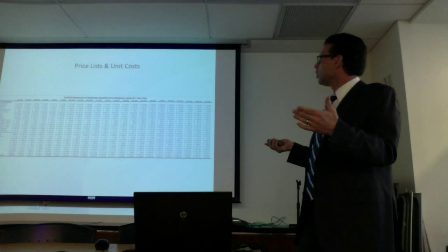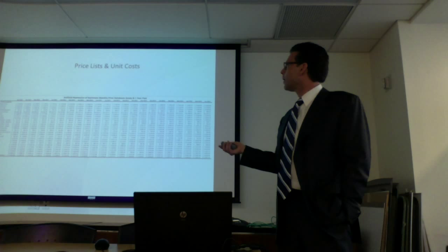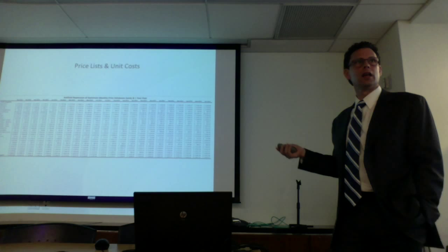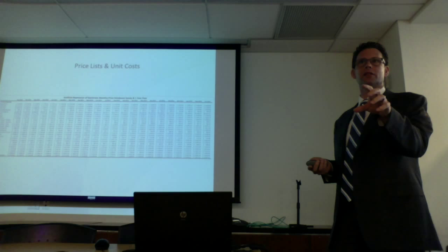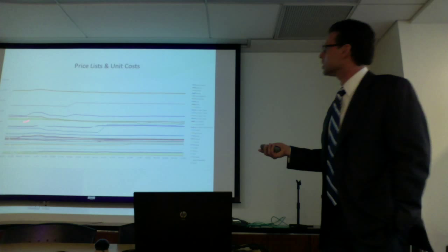So I took a Sandy estimate that was written in, I think, October or November, and I went back to September 2012, 22 months, up to June 2014. What I did is I took the exact same estimate, and I copied it, changed the price list, copied it, changed the price list, and this is a chart of every price list for those 22 months. This is a graph of what happened in Sandy. These are price lists. This is where Sandy happened right here.